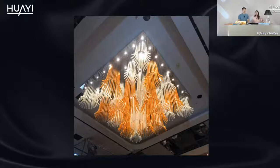Do you mean that same number will be marked down for both canopy and each single part of the glass? For example, there is a big canopy plate, so maybe it divided into 6 parts. So our workers will mark down 1, 2, 3, 4, 5, 6. And then after we install on site, we can know it easily. So they just need to join them as the number we marked down before.